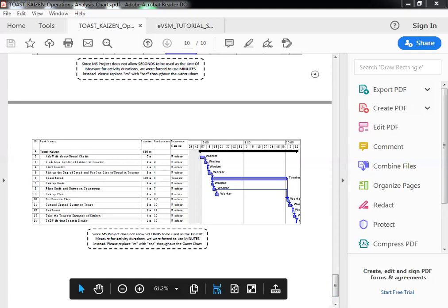And that's telling you what is the resource. Is it the bread being touched? Is it the butter being touched? Is it the knife being touched? Is it the plate being touched, the toaster, or the worker? And in some cases, you will notice it's a combination. 2 or 3 of these elements all have to be touched at the same time, and that is where the coordination and the resource availability becomes an issue, correct?